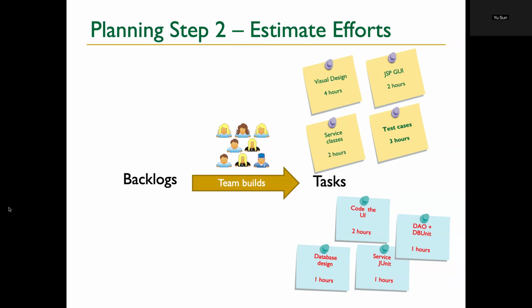Some teams in Amazon, when the team gets very big, treat a 2-hour task as 1 day's work, because you do have a lot of other random things to do. But different teams have different expectations. Also, you rarely see a task bigger than 4 hours, because if it's bigger than 4 hours, that means you need to break it down. It's very hard to plan or estimate a 24-hour task, or a 30-hour task. There's no way you can estimate that. It's too much, so break it down and make it smaller.